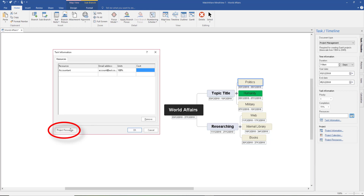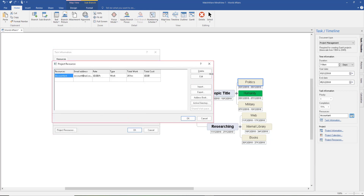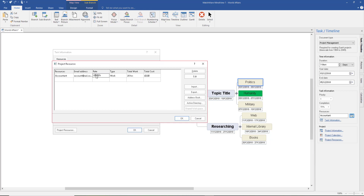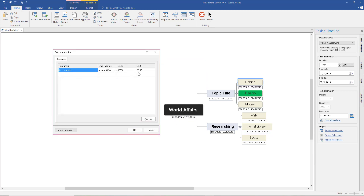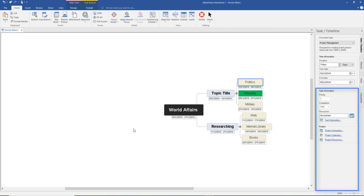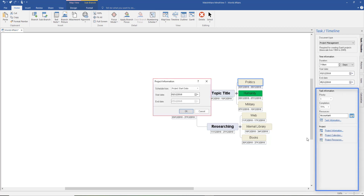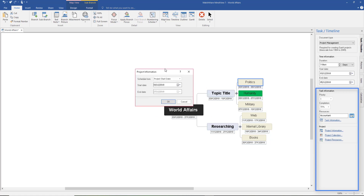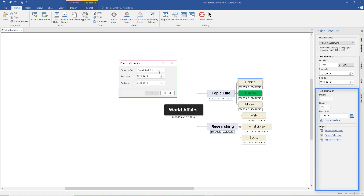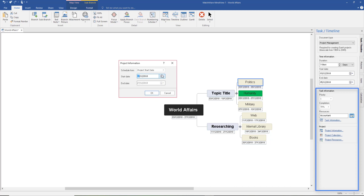Come down to the bottom and select Project Resources, then drag that out. You can add the required information — what you're going to pay them per hour, the type of work from the drop-down menu. If it's work rather than material, add how many hours you want them to work and the total cost calculated from the rate. Click OK. Further down, select Project Information — that tells you the whole date of your project so far, the start and end date, and you can change those by clicking in. That will change the scheduling for you.